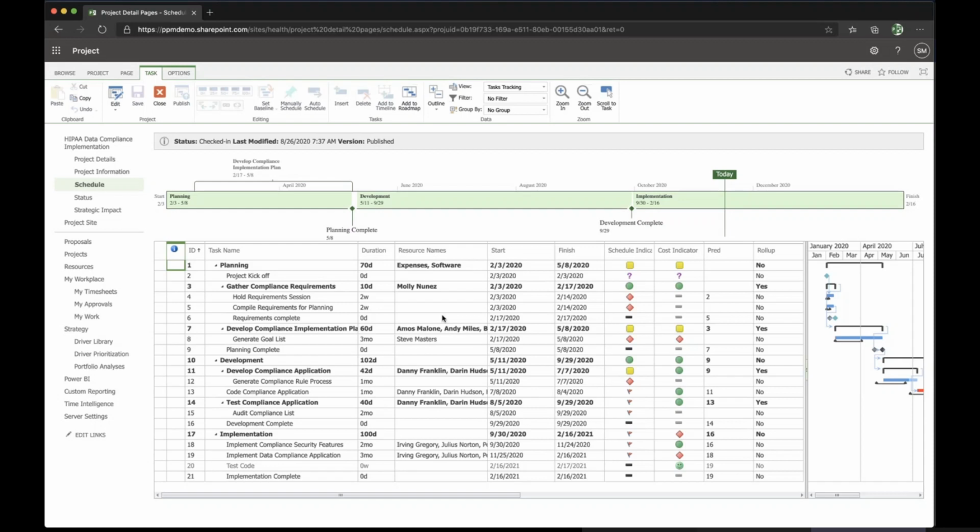All projects change over time. They flex in and out according to the things that are happening when people are getting work done. But the baseline allows us to get a pretty good grip on whether or not we were better at estimating certain things, worse at estimating other things. So it's very common for organizations to institute baselining so that they can improve their estimating process.